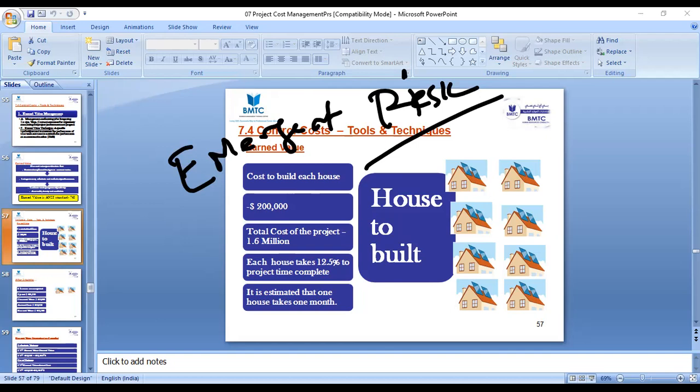Okay, so you need to do the risk identification process continuously. It should be an iterative process. It is applicable to IT projects too. Please be very cautious, because you are doing an IT project and breaking it. How are you going to break your IT projects, as phases or iterations? Iterations. Okay, you are going to develop a product, so you will break that project into multiple iterations, right? So risk management should be performed at the start of each and every iteration.